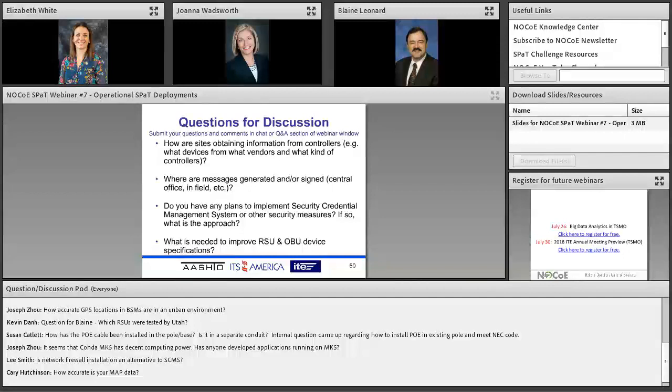Really quicker than that. It's filled out pretty easily, but do account for, I believe it was 4 to 6 weeks for it to be processed by the FCC. They have a backlog of applications to review, so there is a certain time that they allocate for approval of the licenses. So the application itself is not time consuming, but there is a processing time.